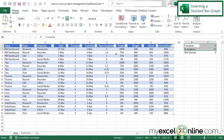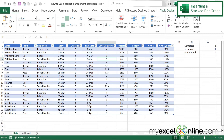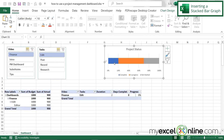However, if I go to the data sheet and change the Days Complete values — for example updating the recording task and bringing one to 100%, then marking one more task at 100% — I now have four complete tasks. Going back to the dashboard, the blue bar has grown to 20%, because four out of twenty tasks is one fifth, which is 20%. So this is correct.